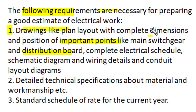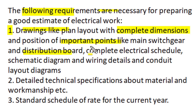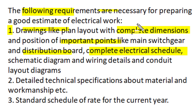The drawing should contain complete dimensions so that measurements can be made accordingly. The plan layout also provides a complete electrical schedule for any room or section — showing how many points are there in a certain part of the electrical installation. That complete detail is called an electrical schedule.